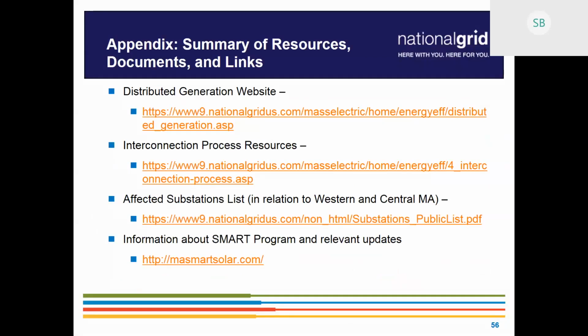They're more aware of the overall congestion within the state, so they're looking at these DG projects more closely than they ever have. You want to anticipate that as you go through the interconnection process, there's likely to be additional time to process these applications and potentially more cost than there had been previously.